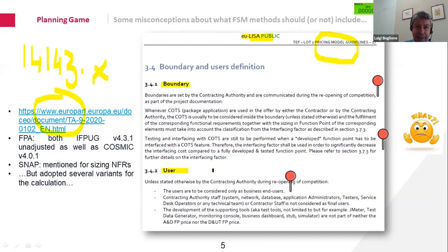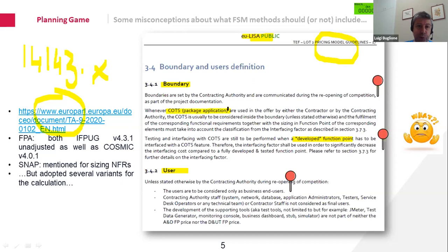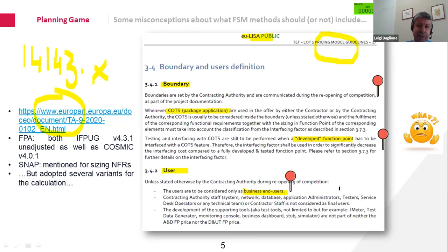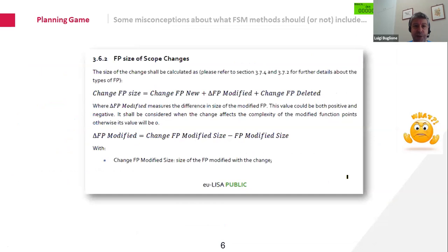The methodologies for sizing have a common house, the ISO 14143 standard family, with six documents describing what is common to IFPUG, COSMIC, NESMA, FISMA, and Mark II sizing models. In contractual documents, the boundary definition and user definition can differ — for instance, this EU-LISA contract defined users as only business users, meaning an IoT application with two machines exchanging data could not formally be sized using function points. This is one of the key misconceptions about functional sizing methods.